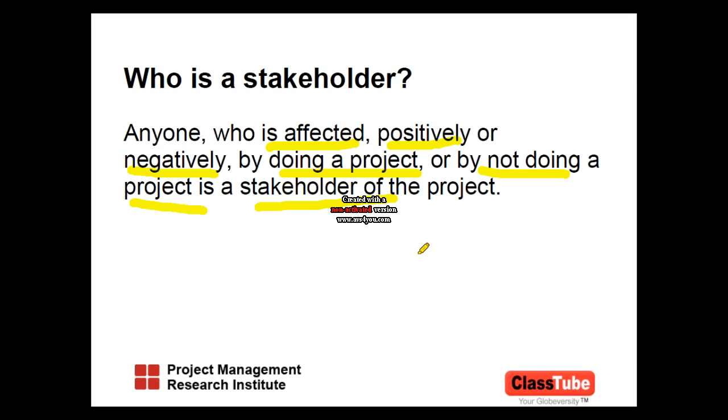of the project. So if you are a project manager for constructing a flyover in a busy junction, maybe the local citizens may be affected negatively in the form of traffic jams and disturbances and dust and noise. So they are stakeholders.